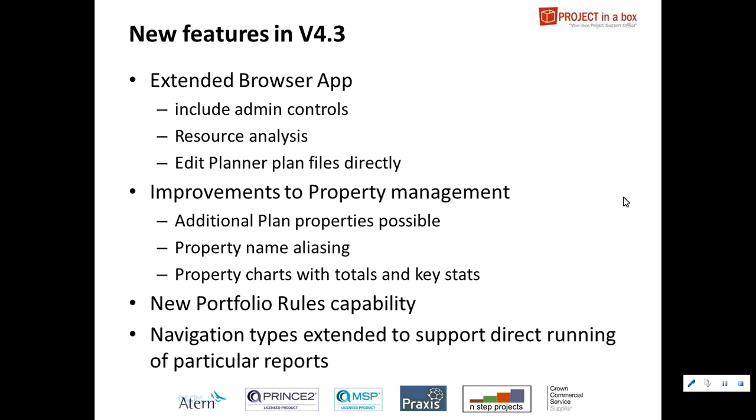So moving then into other areas, we've extended the property management aspect, and this has been very popular for a period of time, having, if you like, a sort of database of metadata for your projects coming in from a range of different sources. So we've extended now the sources again. You've always been able to pull automatically certain fields from your plan, so you've been able to get the first date in the plan and the last date in the plan as a start and end date, percentage complete. You've been able to get the number of overdue tasks and various other statistics which we've calculated automatically.